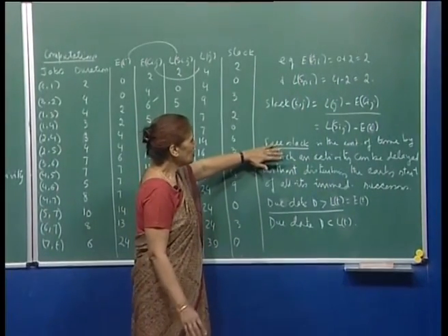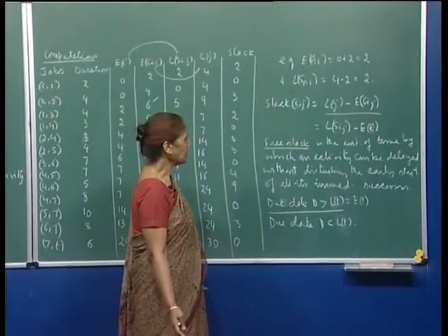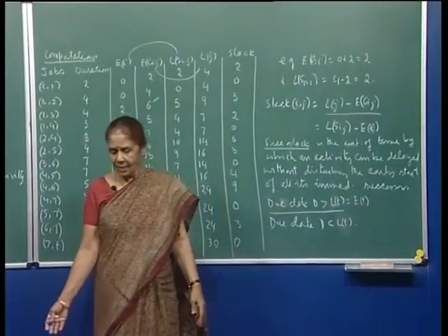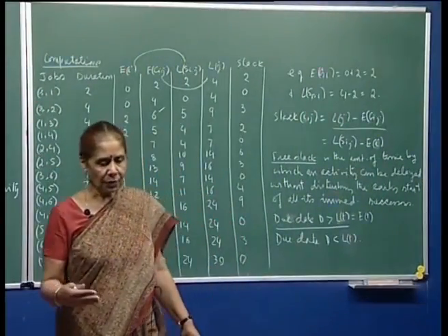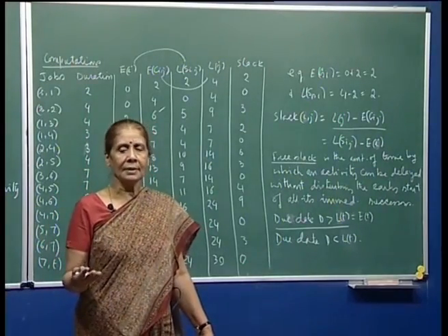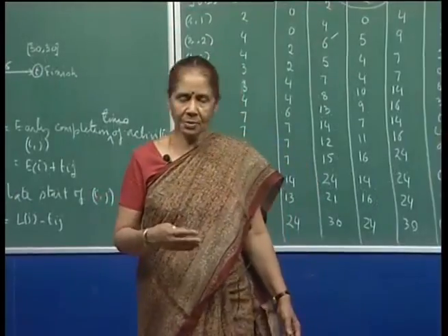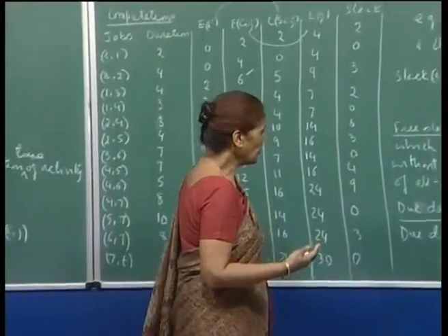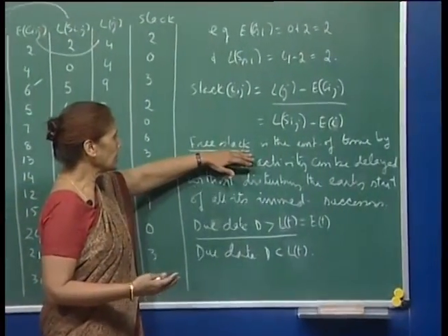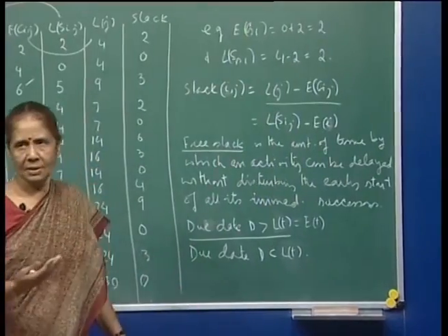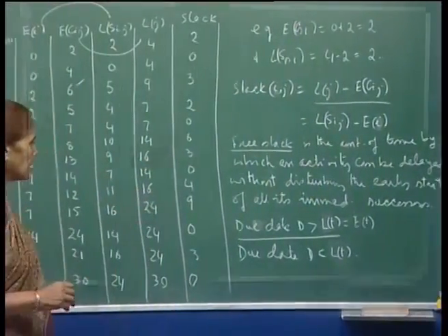But anyway, you can fine tune this concept of slack time, and there is something like free slack, because the manager may also not want to delay the early start of certain activities. So, then for the immediate predecessor, the amount of slack that you can use for that particular activity should be equal to the free slack. So, these are these concepts.